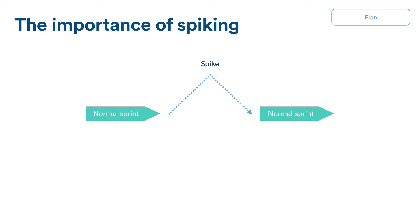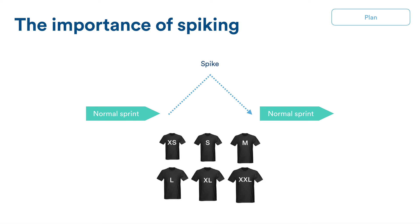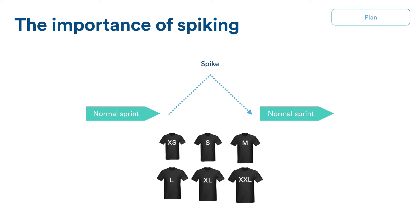So what we do relatively often is we try to spike early and often to validate ideas, identify early blockers, and guesstimate the size of an initiative. So what we do is we break out the constant rhythm of sprints with a spike or innovation weeks, where everyone basically just builds something end-to-end and tries to identify what the big blockers would be to build a feature for real. What we get out of that is estimates, which are t-shirt size. So it could be small, medium, large, x-large, or what we call Godzilla. The new Jira integration that I talked about earlier to get more details on pasted Jira links would have been a medium and was basically spiked in one of these innovation weeks.